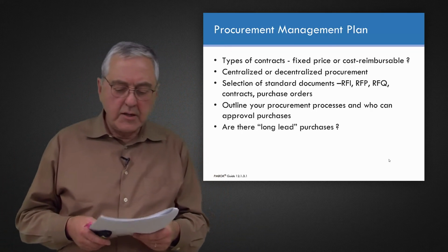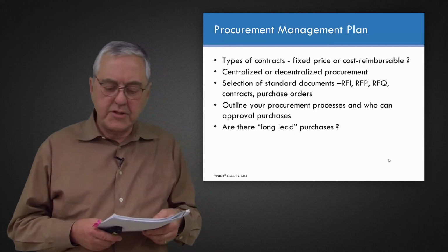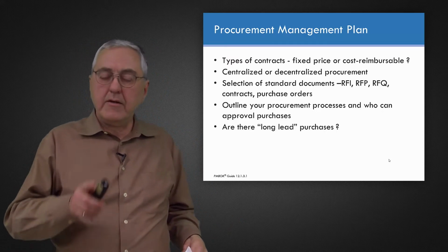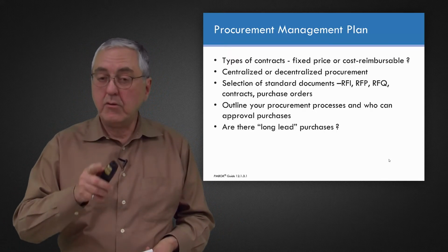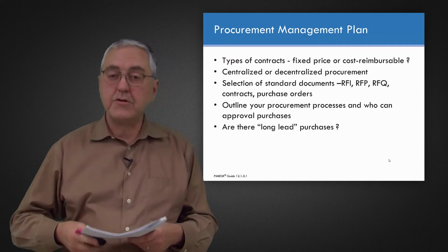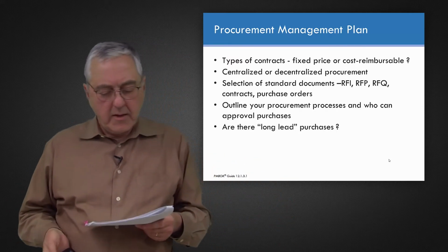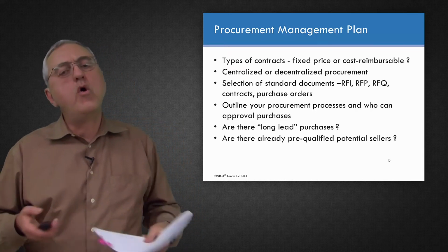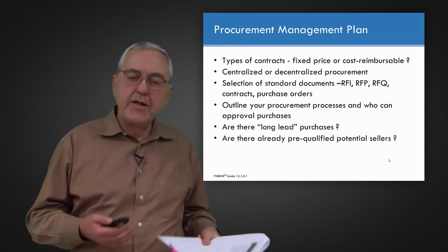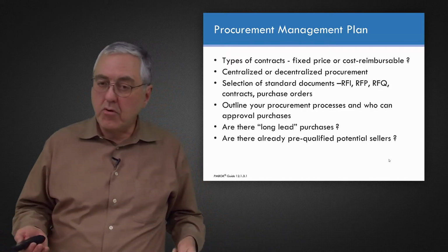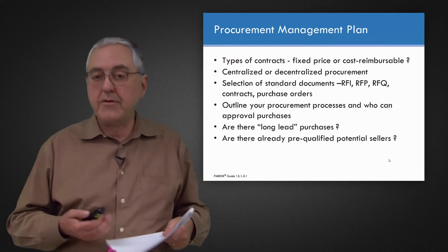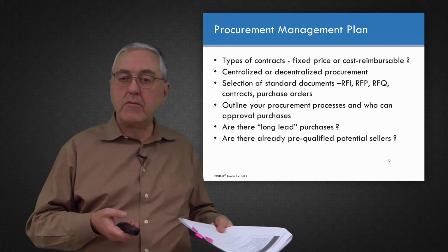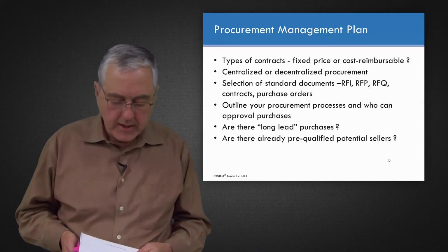Are there some long lead purchases? Are you going to be purchasing some expensive furniture from Scandinavia that might take 6 months to arrive? If that's the case, you'll want to think about getting on those long lead purchases and making them very early. Does your company already know about renovators and interior designers they've used before, who you already know are qualified, who you can go to with your request for proposal, request for quotation?